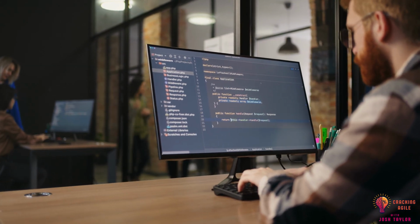The reason you take the extra time to write things down in a traceability matrix is because you will absolutely forget who asked for something later in the project. Trust me. Let's say that we're 5 months into development and an engineer has a question on which hexadecimal colors should be used for the post-it notes in the UI. Well, it's been a minute, and if you're like me, you probably won't remember.